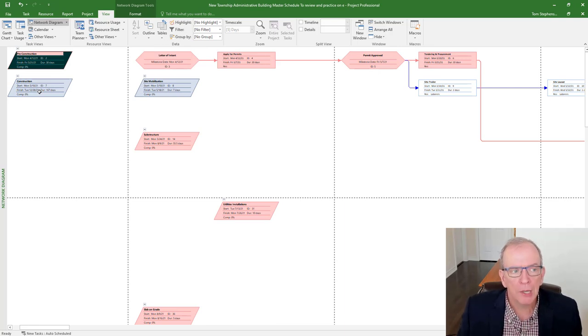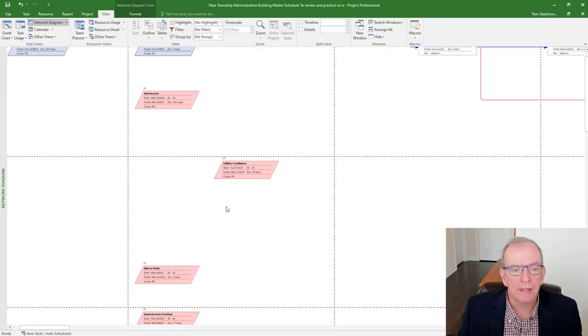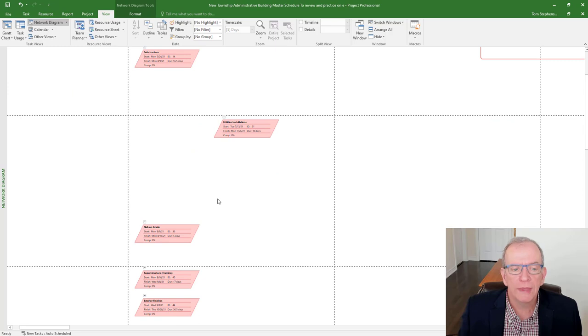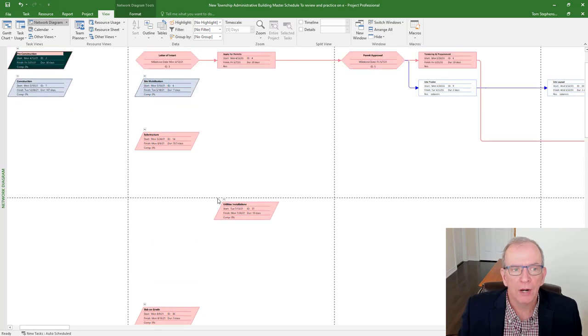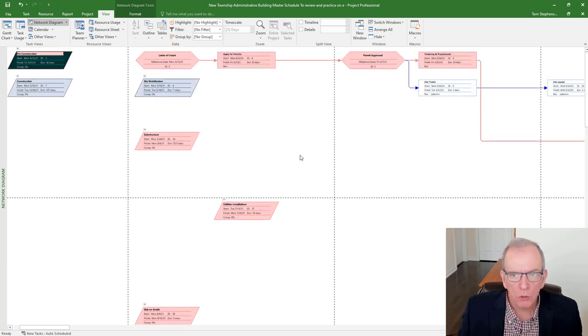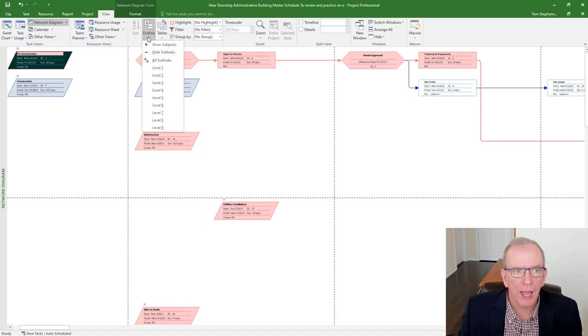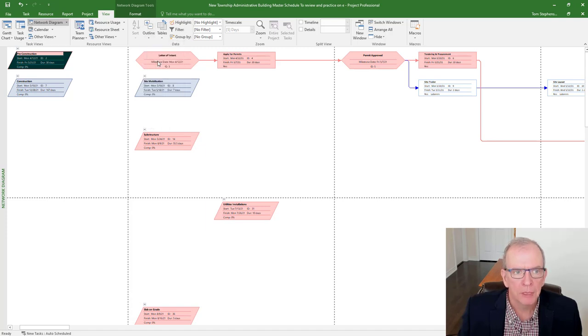For some people that can be really helpful for them because they can see the project as it's flowing this way. I know people that have clients and when they show the clients the network diagram, it makes a lot more sense to them than even the bar chart does. So the calculations for the critical path, it's all based on the network. Now, all these floating parallelograms that you see, those are my headings. I don't want them connected. So that's fine.